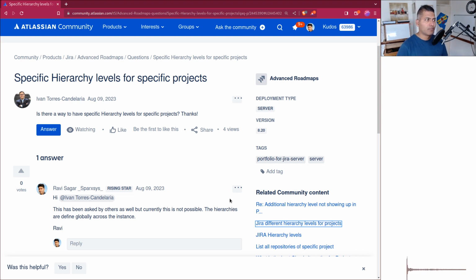And if you are using Advanced Roadmaps for planning across different teams and different projects for a couple of months or more, then of course it gives you the ability to work on the hierarchy, maybe starting from a goal. Maybe your goal is that you want to capture the UK market by end of Q4 2023, and you will then break down your goal into, let us say, initiatives, and then into maybe epics and stories further. A good thing about Advanced Roadmaps is that you can create views for people who just want to focus on a specific level.